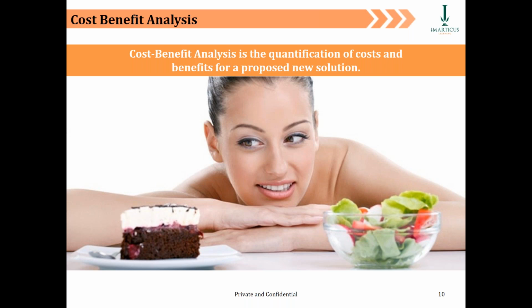And many times it's in between. There are benefits, but the benefits will translate to you after 2, 3, 4 years, which means the break even of this cost model will be longer than expected. That is the time when business stakeholders sit together with the business analyst and take a tactical decision whether to go ahead and invest in the project build up, because it will be very beneficial not for the immediate future but for the later future.